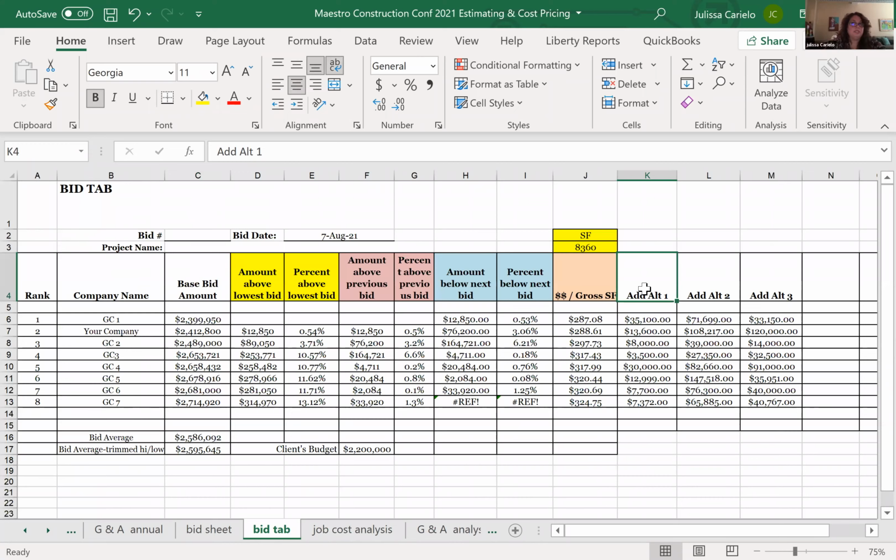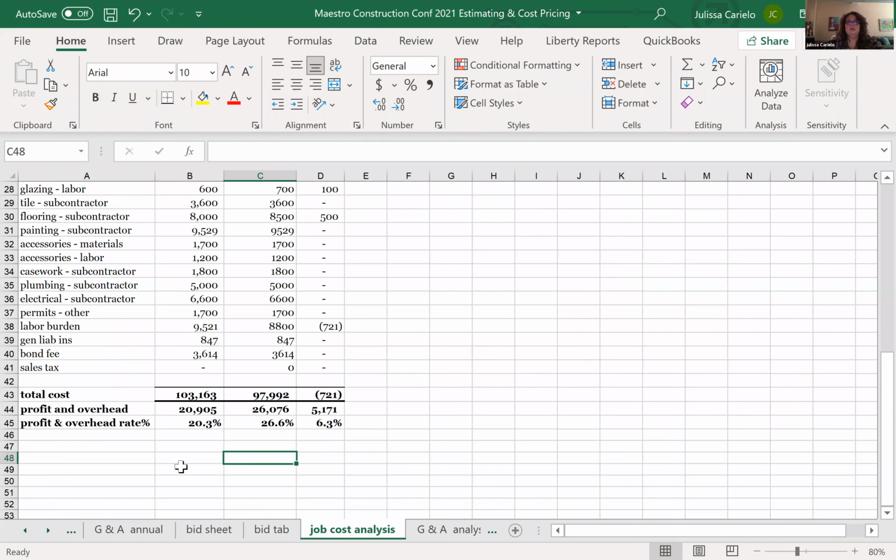Oh, okay. This is when you have a bid that the client gives alternates that says, price this, but price this as an alternate just in case I want to add the extra flooring, or I want to paint a different color, or something like that. These are just alternates. The clients come in and say, also price a canopy for me. I don't want it in the bid, but I want it extra so I can decide if I want it or not. Okay, any questions on this page before I go to the next one? I think that was the only one.